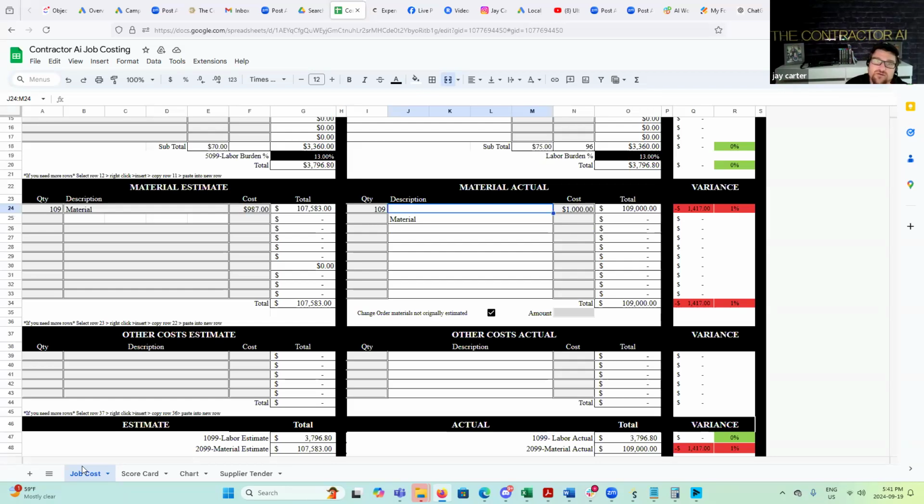190,000 pounds of steel. I did that knowing that it's the next 90 days of my inventory. We buy it up cash up front because I know I'm making more money than a credit card. It's a great place to invest your money, and I'm turning that over very quickly. My supplier loves me, but what else do I get that's different than everybody else? What do you think I get?